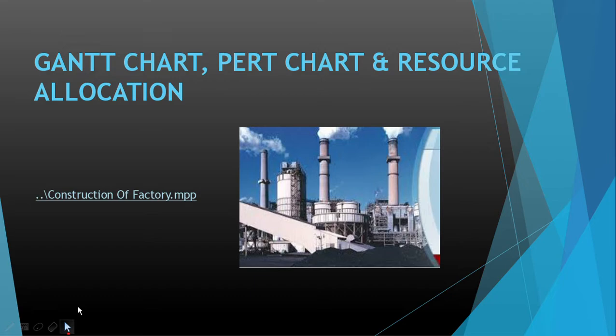We have limited resources which can be applied to multiple activities. Thus, resources should be allocated in such a way that one particular resource is not allocated to two different activities at the same time. Neither should any resource be kept idle for a long time. If any resource is idle for quite a long time, then it is applied to a different project by the project manager.